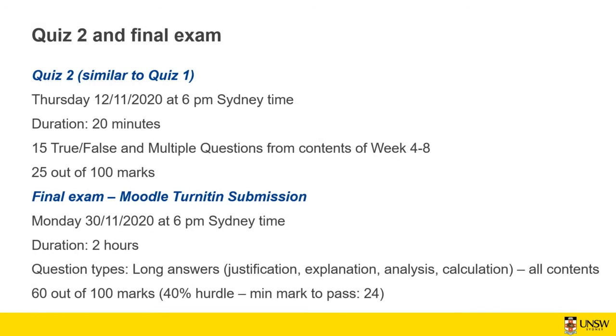Yep. So BAC is the cumulative PV. All the PVs are aggregated at the end when the project is completed. So you need to spend that sum of money. The total sum of all the tasks on the project, all the PVs on the project, gives you BAC.